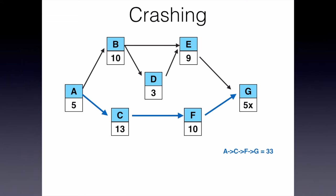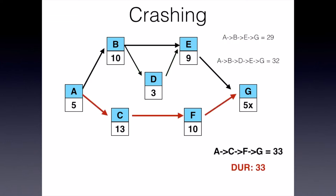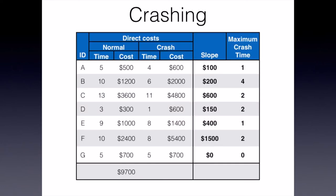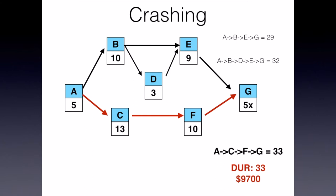So I need to figure out what is the critical path, because I want to concentrate on just those tasks on the critical path. Adding things up: the path A-C-F-G is 33 days, A-B-E-G is 29 days, and A-B-D-E-G is 32 days. So it looks like the first path is my critical path, giving my overall project a duration of 33 days. I'm going to first look at what is the cost of my project under normal conditions — adding up all these direct costs, I find that my project is going to cost $9,700.